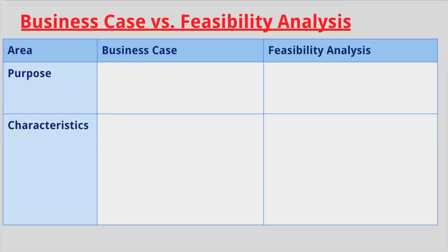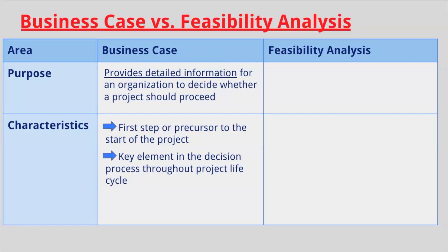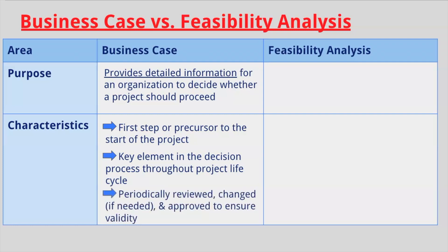Let's solidify our understanding between a business case and a feasibility analysis. The purpose of a business case is to provide detailed information for an organization to decide whether a project should proceed. Characteristics of a business case include being the first step or precursor to the start of the project, serving as a key element in the decision process throughout the project lifecycle, and being periodically reviewed, changed, and approved to ensure validity.